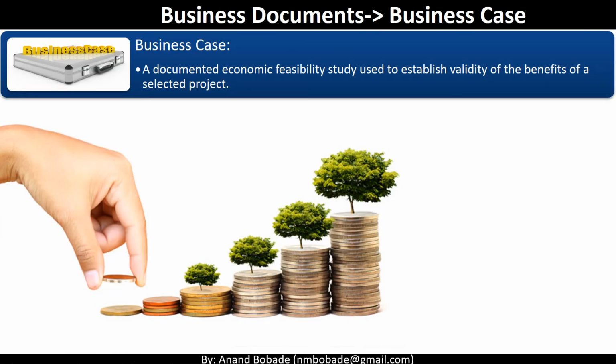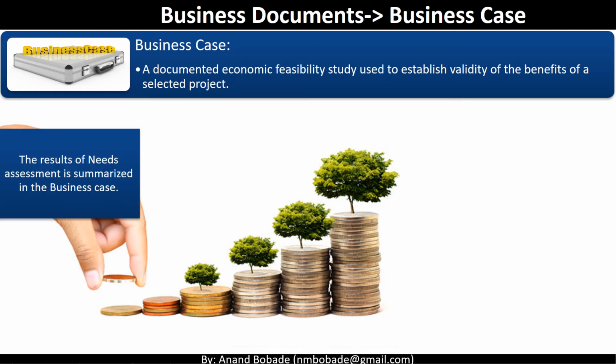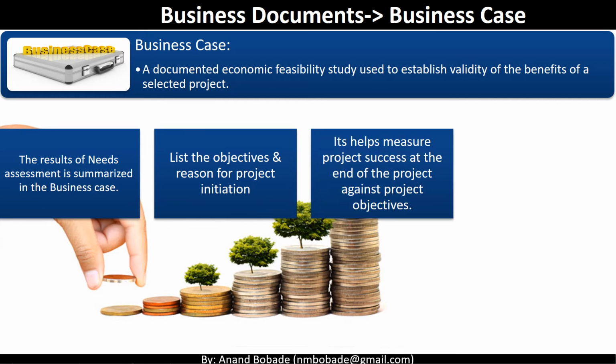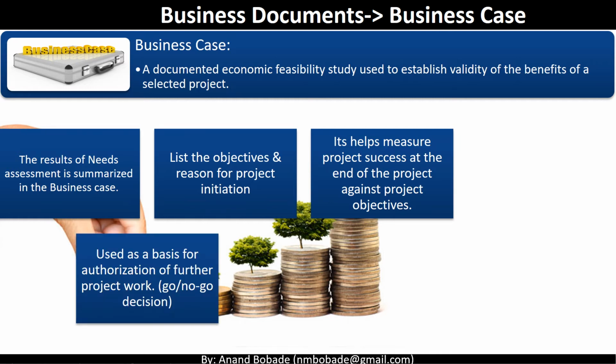So let's understand these business documents starting with a business case. What is a business case? It is a documented economic feasibility study used to establish the validity of the benefits of a selected project. The results of the needs assessment are summarized in this business case. It will have a list of objectives and reasons for project initiation. It helps measure project success at the end of a project against the project objective. It is also used as a basis for authorization of further project work, sometimes referred to as a go/no-go decision.